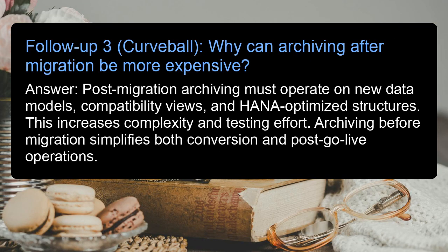Follow-up 3, curveball: Why can archiving after migration be more expensive? Answer: post-migration archiving must operate on new data models, compatibility views, and HANA-optimized structures. This increases complexity and testing effort. Archiving before migration simplifies both conversion and post-go-live operations.